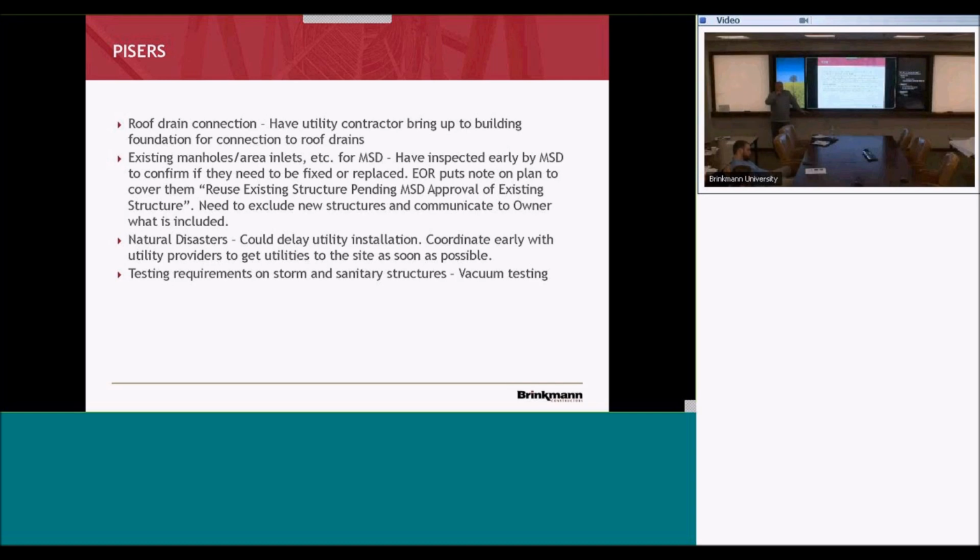Pretty blatant mistake. And if you had to get that inspected by your local jurisdiction, they're gonna want the plugs, because it costs more. That's just how it usually ends up. So if you don't catch that up front, it's gonna cost you money and work on the back end.